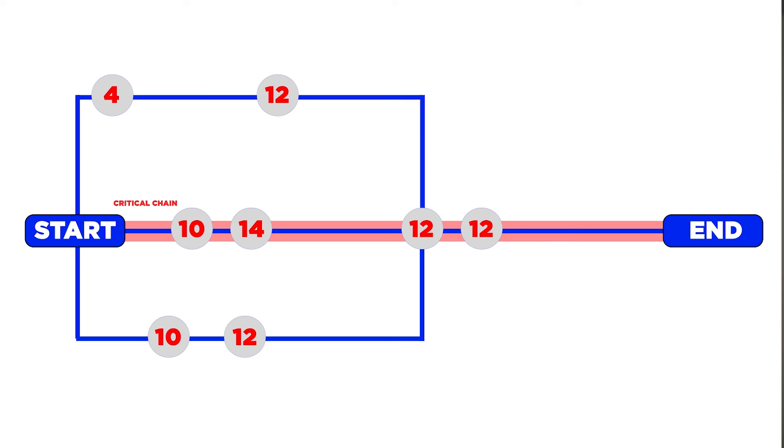To implement the critical chain on an established critical path, you need to go through nine steps. Step one: cut down all time estimates by 50%. You'll still have the remaining 50% of estimates as buffers. The thinking behind this step is to address Parkinson's Law, which states that work expands to fill the time allotted. By halving the estimate, we change the dynamic — time is no longer abundant for each individual task, yet we have the buffer and the schedule as a contingency.